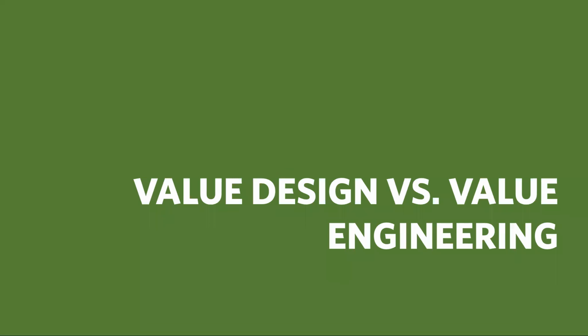It might be helpful to talk a little bit about value engineering and how it's different from what we call value design. Many of you might be familiar with this history, but General Electric invented value engineering during World War II because of the war. There were all kinds of raw materials and component shortages. And to ensure the continuity of their production, the engineers at GE looked for acceptable alternative parts in the original design.